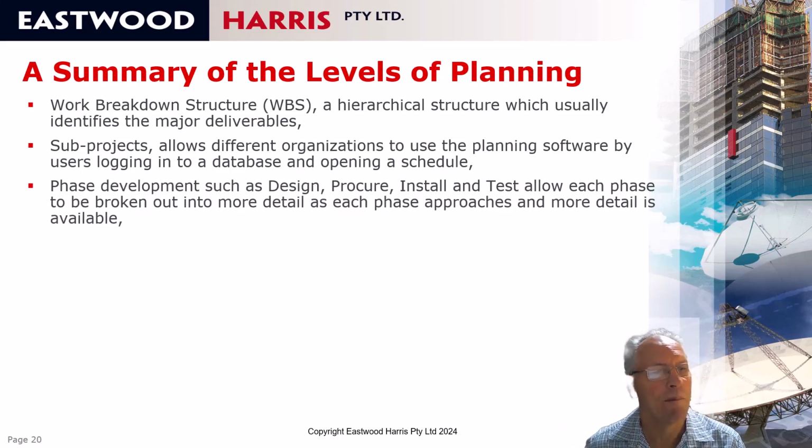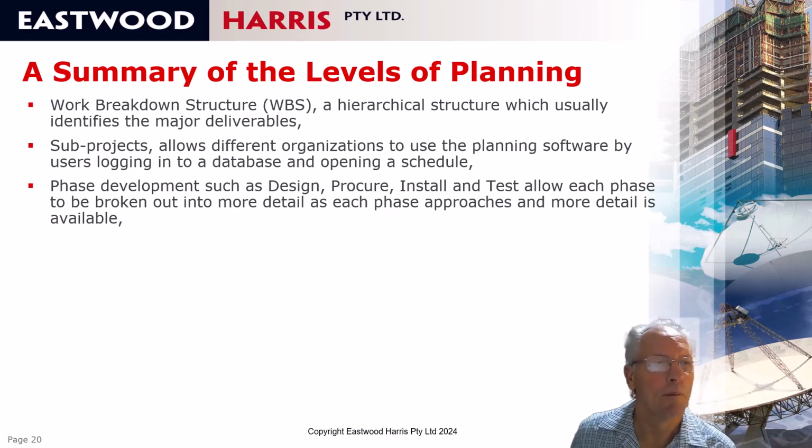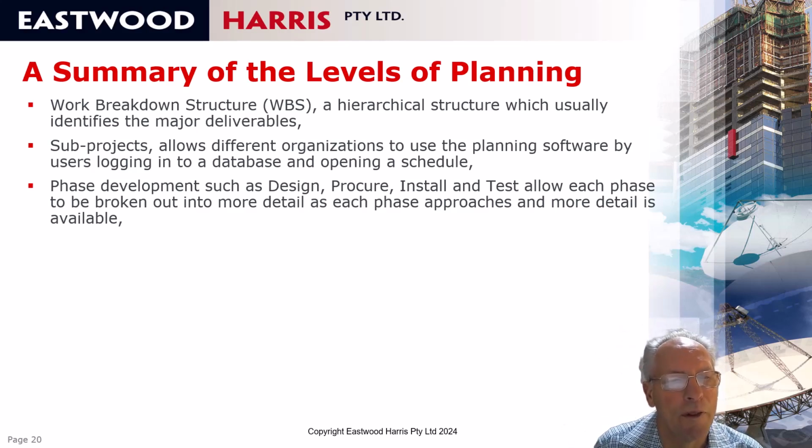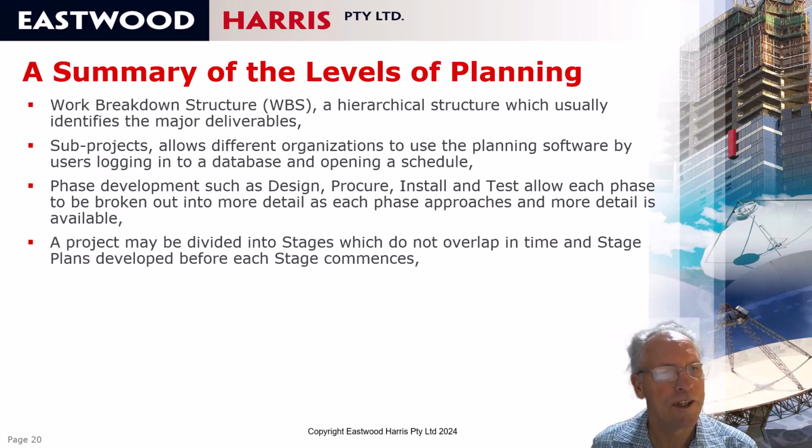There's phase development, so phases generally overlap. For example, you might have a contract program, and then before you start the design, you'll develop the design program in detail. Once you have enough information to go on to procurement, then you can do your procurement program. And once you understand when the equipment is going to be delivered, you can do your installation program. So in phase development, phases overlap, and you would develop a program for each phase before you start executing that phase. Also stages.